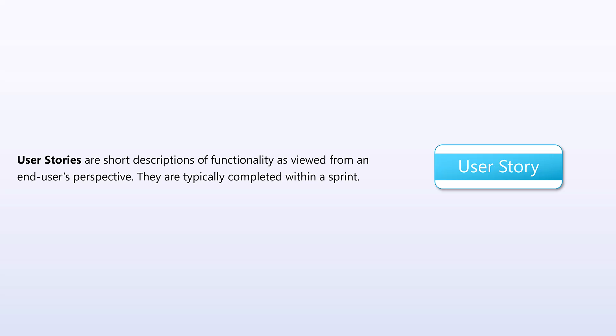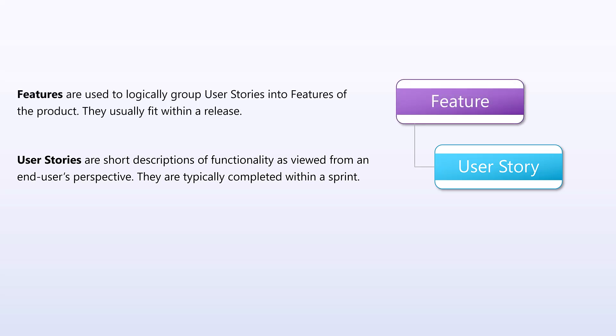A work item type is effectively an epic, a feature, a user story, a task, or a bug, and each one of these serves a specific purpose in your project lifecycle. User stories are short descriptions of functionality as viewed from an end user perspective. They are typically delivered within a sprint. Features are used to logically group user stories into features of a product. They usually fit within a release.